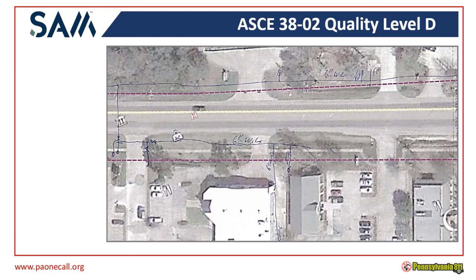So the records, depending on how good they are, are going to give you the quality of information. As you can see from this slide, the record was just hand drawn on by someone. So this isn't accurate to exactly where that water line could be. And when you're doing your planning and design process, you're trying to design around the water line, or if you're hooking up to that water line, you're trying to find out exactly where it is. This record's not really going to help you the best.